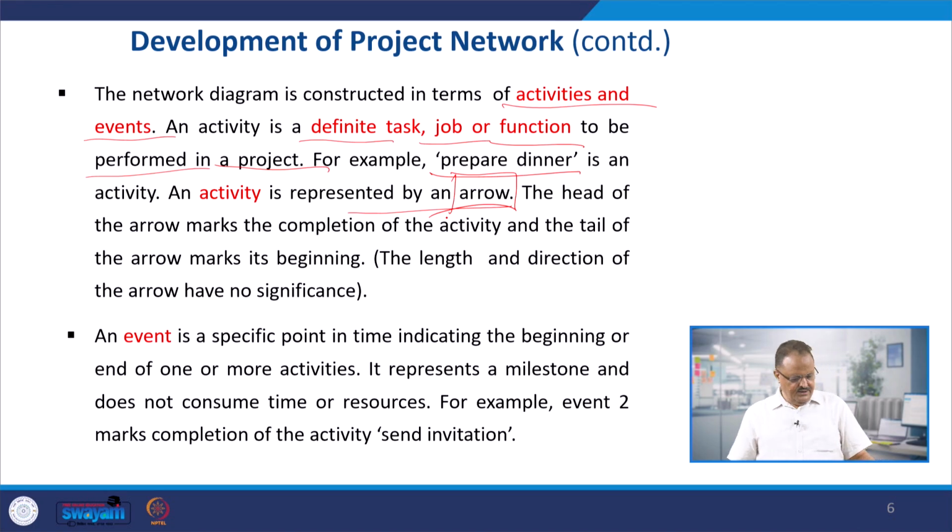I told you, the head of the arrow marks the completion of the activity, and the tail of the arrow marks its beginning, right? And the length and direction of these arrows have no significance. You only have to look at the head and tail. So the head marks the completion, and the tail is the beginning of the activity.